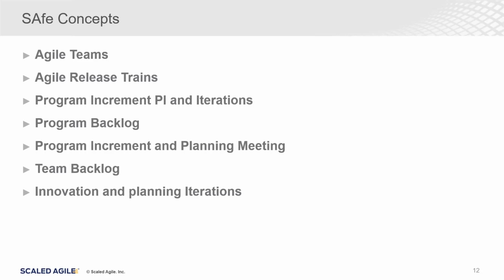And we know the program backlog, what it consists of, the features. If there are any technical spikes, we call them enablers. You know the technical spikes, right? If a feature is not clear and needs some further investigation, we create spikes in agile. That we call here enablers. So that is also maintained in it. The program increments, the planning, and everything will be planned here.